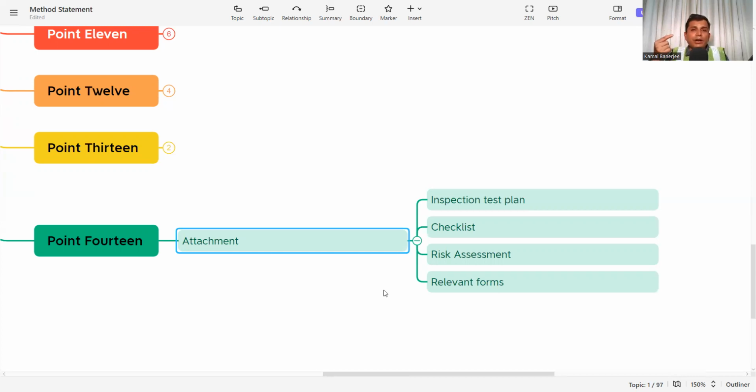So whenever anybody goes to check, they check one by one, and everything is okay, tick, tick, tick, tick, tick. So it is okay, approved. So a comprehensive checklist is very much essential. Otherwise, it will vary from person to person, and there will be a problem whenever you are working at the site. So first you need to prepare the checklist, and it will be handed over to the client or the consultant, so that they check as per this checklist.